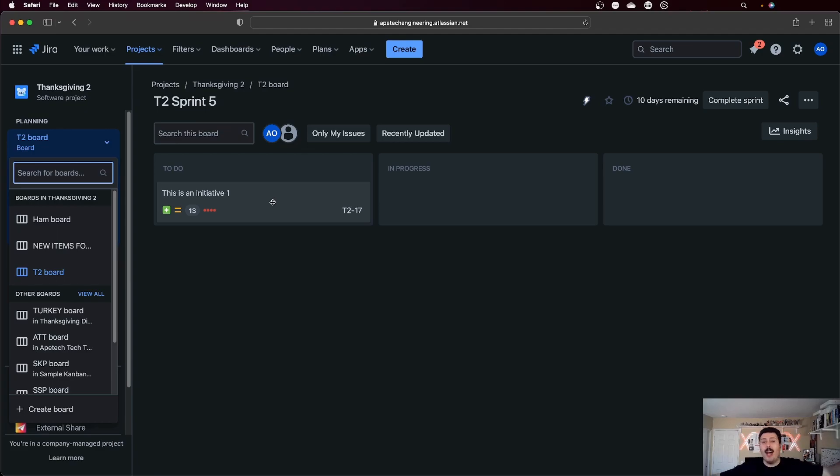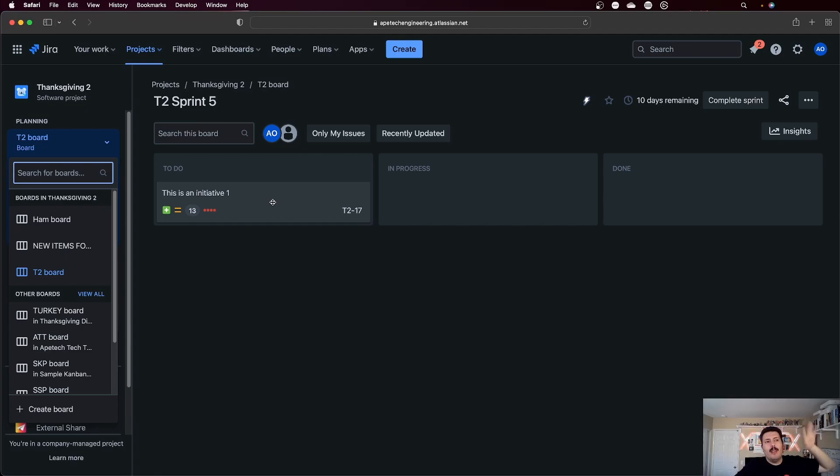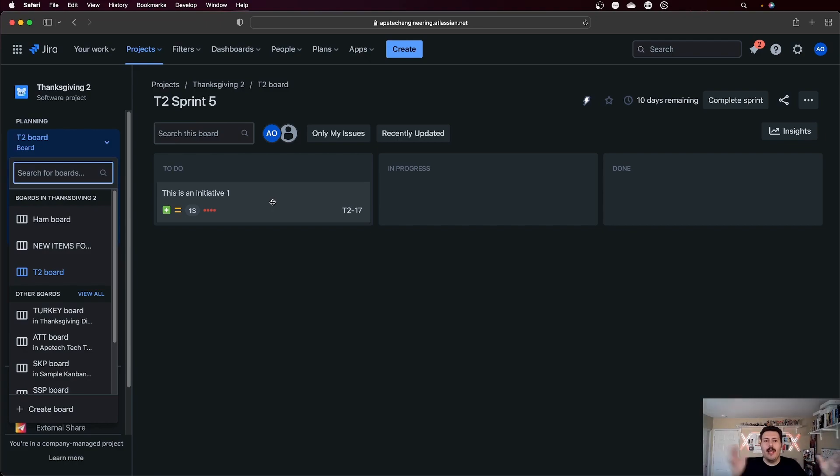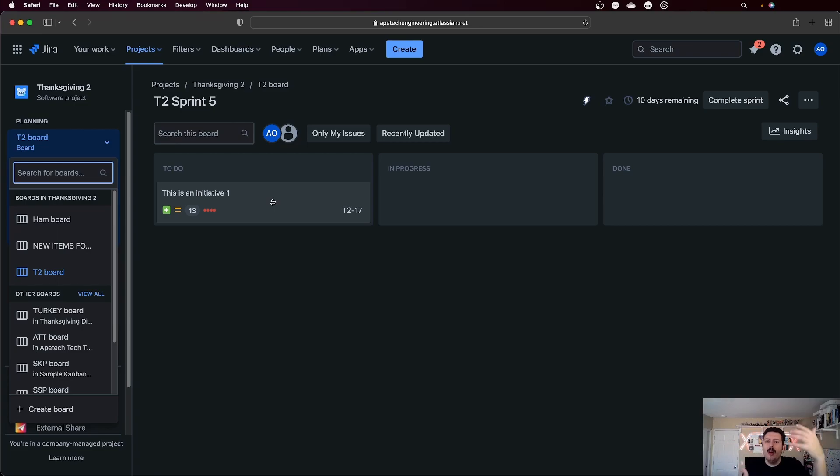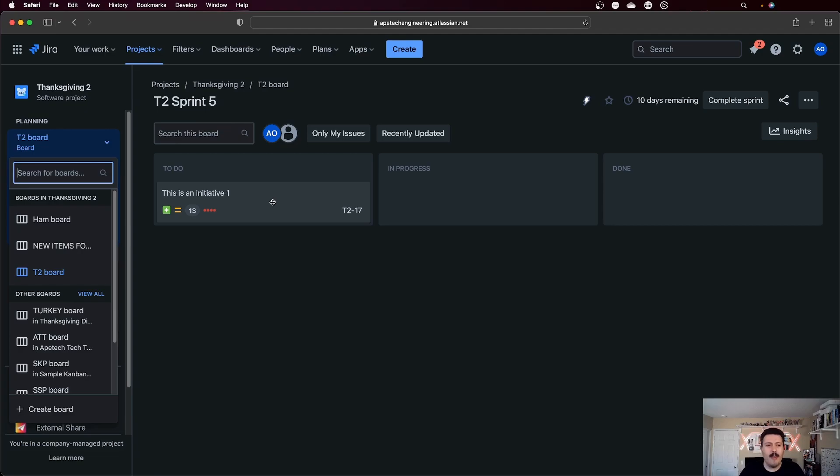Now, this is not a problem if you're in Kanban. In fact, in Kanban, this is probably the behavior you want because the Kanban board will help you visualize everything. And it doesn't matter if one board moves it to done or another board moves it to done because you just want to see that the issues are done. And so in Kanban, this is not a problem. This is only a problem when we're talking scrum because it goes into those two sprints and it will close both sprints out when whatever sprint closes out first is going to close everything out. So this is the only time we have a problem with this situation. So I want to make sure I address it here as clear as possible.